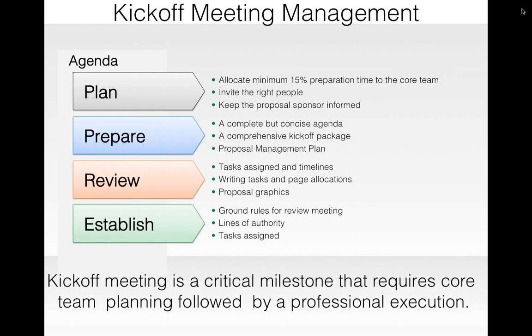So prepare a RACI matrix of all the roles and responsibilities and all the tasks which you have in the proposal management, and use that for establishing a proper line of authority. And finally, every role should have a properly defined set of tasks with their schedules established at the end of the kickoff meeting.